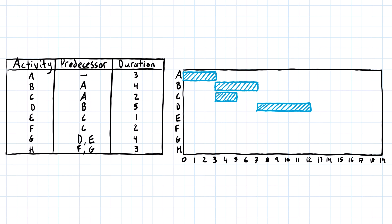Activity E depends on C, so it can't start until C is finished, and it's one day long. C ends at the end of the fifth day, so we drop down to the line for activity E — it's just one day, so we draw it right there. Activity F also depends on C and is two days long. We see where C ends, so F starts at the same point as activity E, and it's two days long.